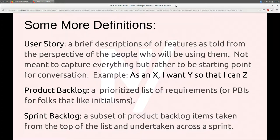A user story, often used in scrum, is a way of describing something that we're going to build. It usually takes the form of 'as X, I want Y, so that I can Z.' It doesn't have to — it's not meant to completely describe what you're building. It's just meant to be a bookmark or placeholder for a conversation about what you're building, something to remind you of the specifics so you can have that conversation with stakeholders and development teammates.